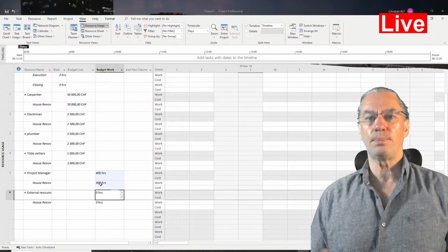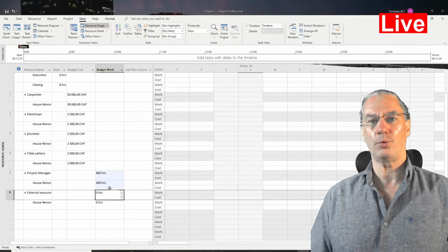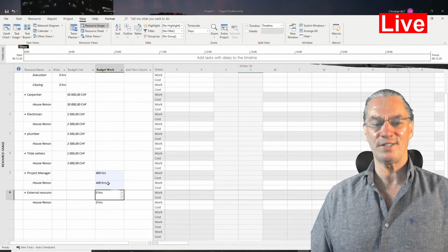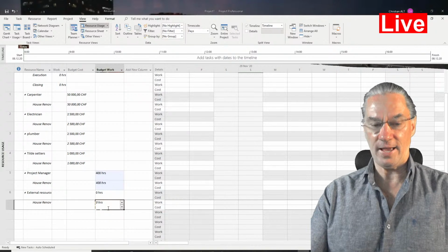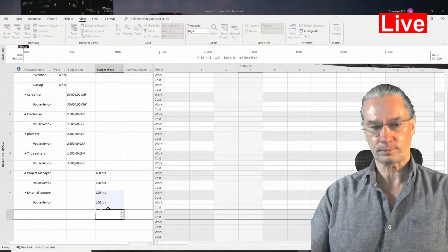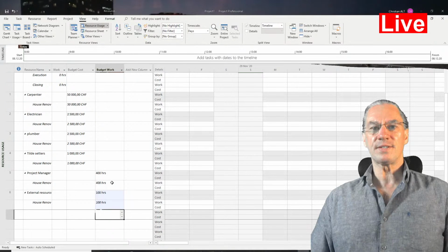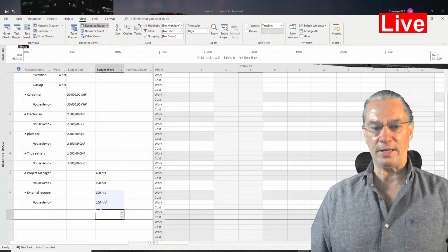So this part takes a lot of time. But in our budget there were 400 hours for this, and the external resource will help me for about 100 hours. So with this I have defined those two work resources in the budget work column here.